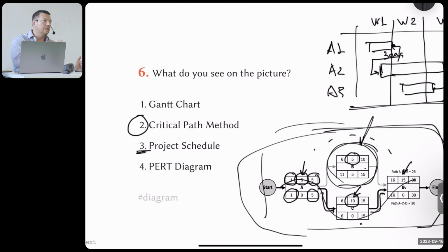Until it's signed, until you have the baseline, the project manager doesn't move forward. You don't make a step forward. You don't do anything. You don't spend a dollar of the resources of the project. You wait until the customer says, yes, I agree with this baseline. Then you start spending money, start spending resources, giving people the tasks to do. And if something changes, you redo the baseline and do it again.